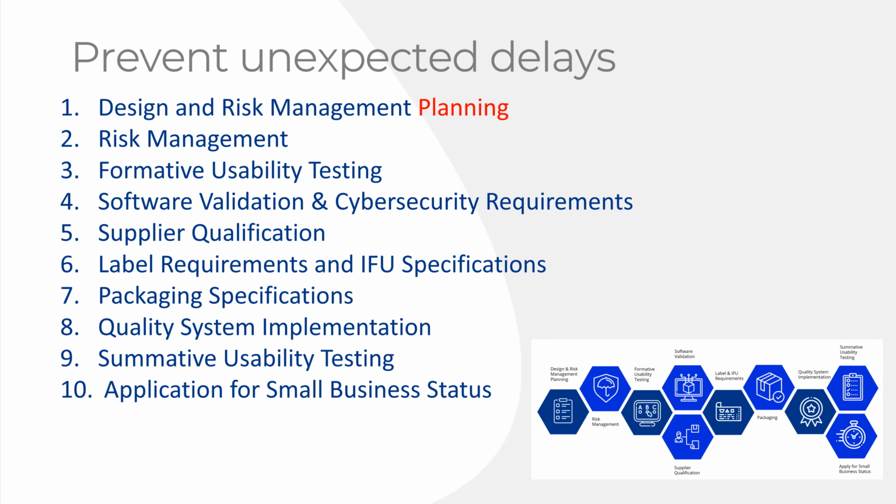So develop that early and have an ongoing draft that's finalized when you do your design freeze. Packaging specs, often an afterthought. But if you've never made a sterile product before and never validated sterilization before, you don't realize how big of an order you're going to have to place.